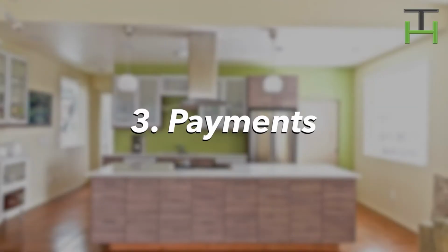Number 3 is payments. How are payments going to be made? Are they through a bank? Is it directly from you and you're personally financing it? However that looks, make sure you have all that nailed down. How long it's going to take from the time you receive the draw, which is what we call it. I send you a sheet that says these are the costs and these are all of the associated invoices, and you have all the backup that you need, and then you have to write a check. If everything's okay, you need to write a check within 5 days or whatever. So that's payments.